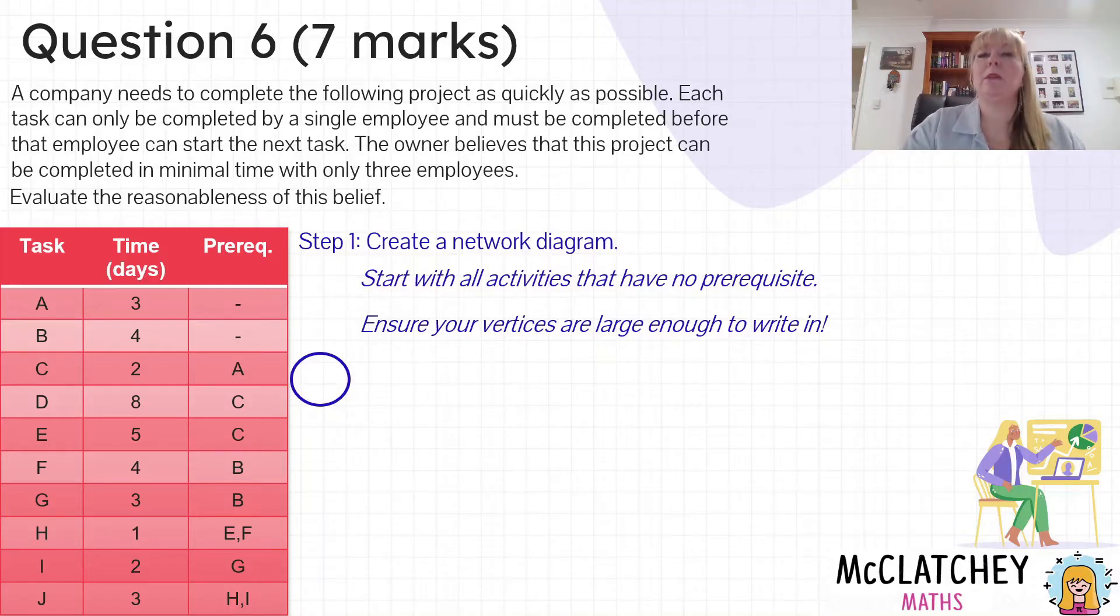If you try and write all that inside the bubble as well as forward scan and backward scan, you are in for an absolute mess. So follow this video and watch what I'm doing. We're going to start with all our activities that have no prerequisite. You can see that's activity A and activity B. They are both coming out of our starting vertex.